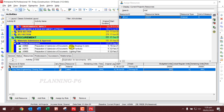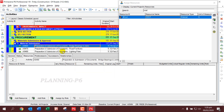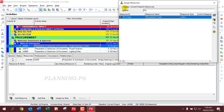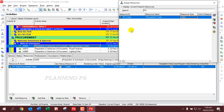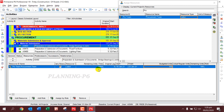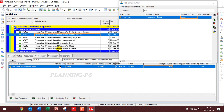For the procurement activity, we will assign resources using the same window. We assign the Procurement Team — double-click on it. Let's change the budget units to five hundred dollars. Here you can also see the budget unit per day for our resources.